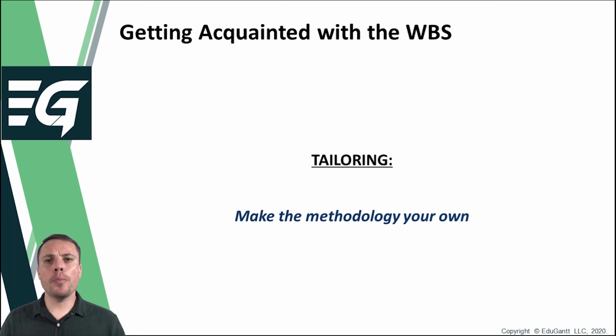We personally prefer to make use of the PMBOK method, and we limited the work breakdown structure detail to work package level. Then again, Gerrit, our content creator, is mostly involved in intricate and complex engineering projects which consist of several disciplines and a multitude of activities. Trying to include all these in the WBS would make for a very clumsy document that cannot really be used to assist in execution management. The choice of the approach remains the prerogative of the project manager within the boundaries of what his or her employing organization will allow, of course.